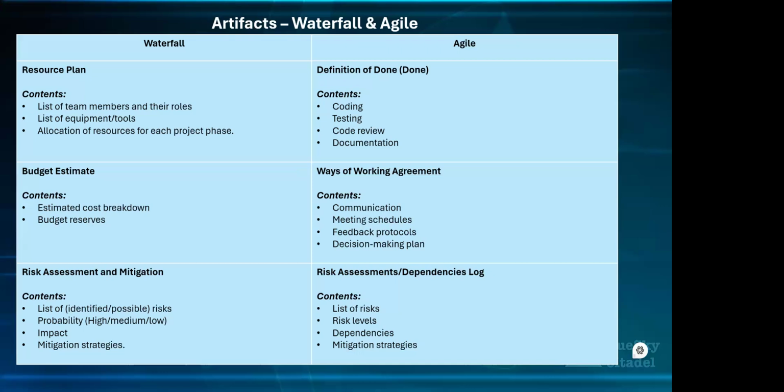So if you have a budget of 1 million, there is a percentage that I think is, I'm not sure if it's 10 or 15%, of your total budget that you want to put aside as reserve. So if you have, like I said, 1 million and it's 10%, you're setting 100,000 pounds aside. So you only have 900,000 to budget, because your reserve is for contingency. It's a contingency fund. You don't want to touch it. It's for emergency. Okay, so what I have is just the 900,000, not 1 million. That's just an example.